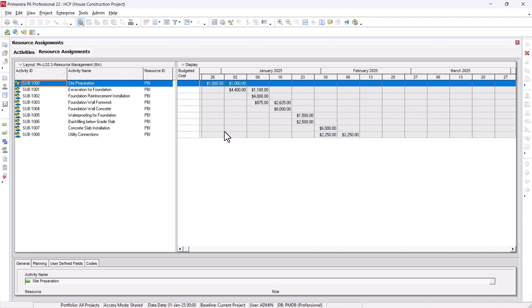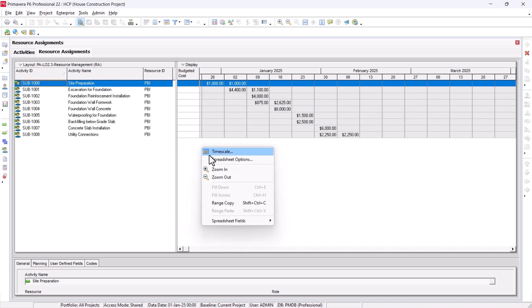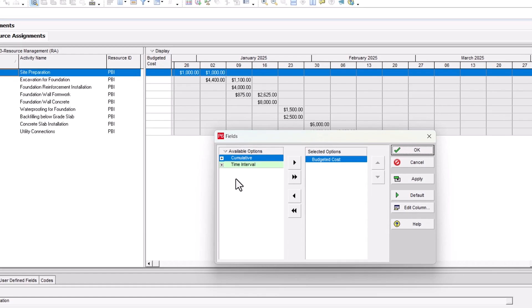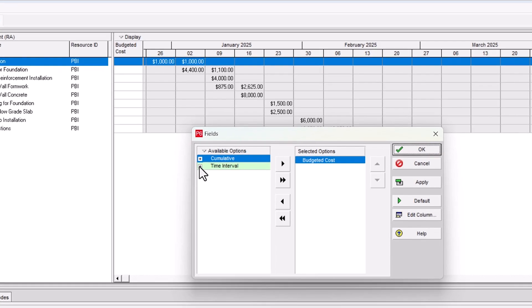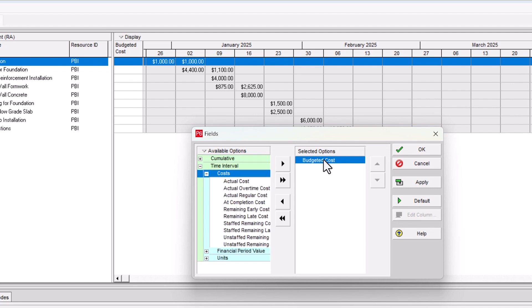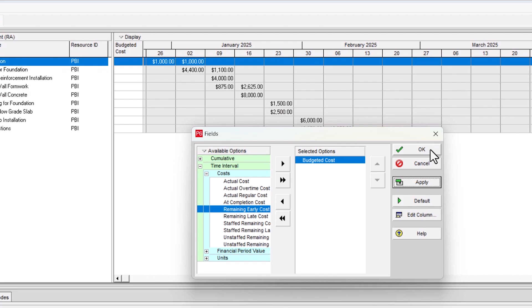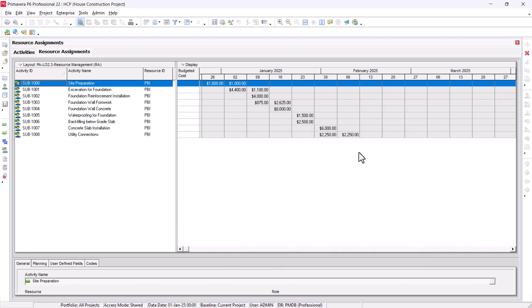Similarly, on the right hand side, I have budgeted cost. This can be brought up here by going to spreadsheet field under the customize, and you can go to time interval and under the cost. You can get the budgeted cost from here. As you can see here, it's right here. Hit apply.